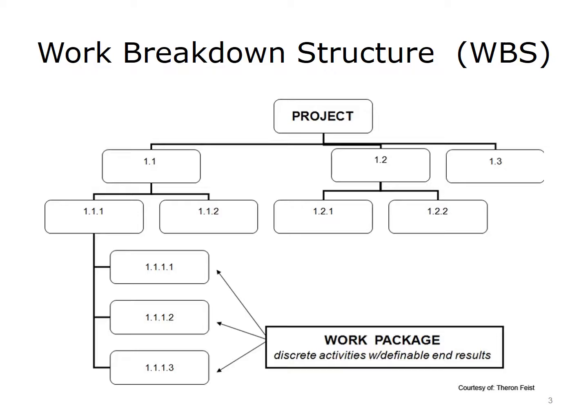In theory, work packages are typically 8 to 80 hours of work. The project manager should break the work down until a realistic chunk of work, or a deliverable, is reached that can be scheduled, assigned to be performed, cost estimated, monitored, and controlled. The key outputs of the WBS process are the WBS itself, the WBS dictionary, and the scope baseline.